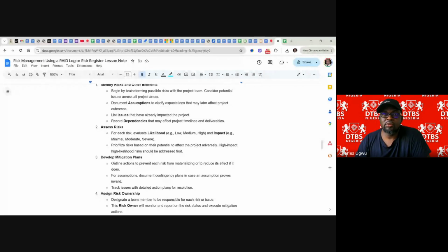And it can equally happen in the timeline. If we have 6 months for a project, we can't plan everything on the 6 months. We can say we are going to deliver this CRM system in 4 months, although we have 6 months, but we agree to deliver it in 4. So 2 months becomes our contingency timeline.